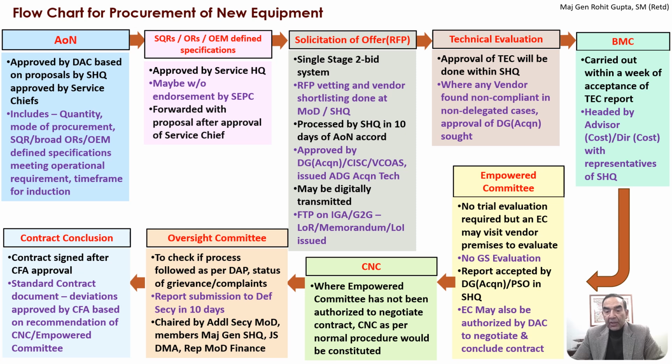The empowered committee may also be authorized by the DAC, it's only by the DAC, to negotiate and conclude contracts. So a multidisciplinary team which is going out to evaluate the equipment without trials can also conclude the contract by negotiating and concluding the contract. Basically, the elements of finance, etc. of the MOD finance would also have to be added to the team to make it a full empowered committee